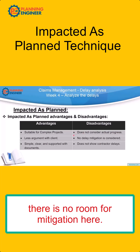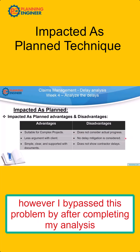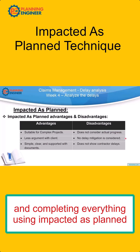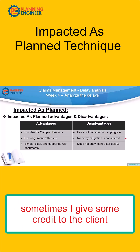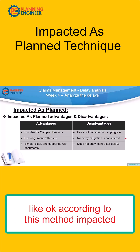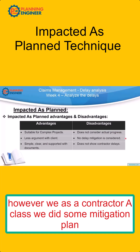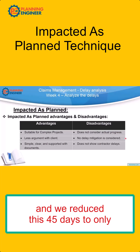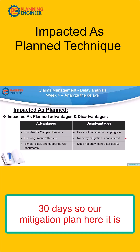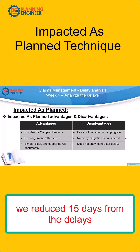When using Impacted as Planned, there is no room for mitigation built in. However, I bypass this problem by, after completing my analysis using Impacted as Planned, giving some credit to the client. For example: according to this method I am entitled to 45 days, but as a contractor we implemented a mitigation plan and reduced it to only 30 days — meaning we absorbed 15 days of delays through mitigation.